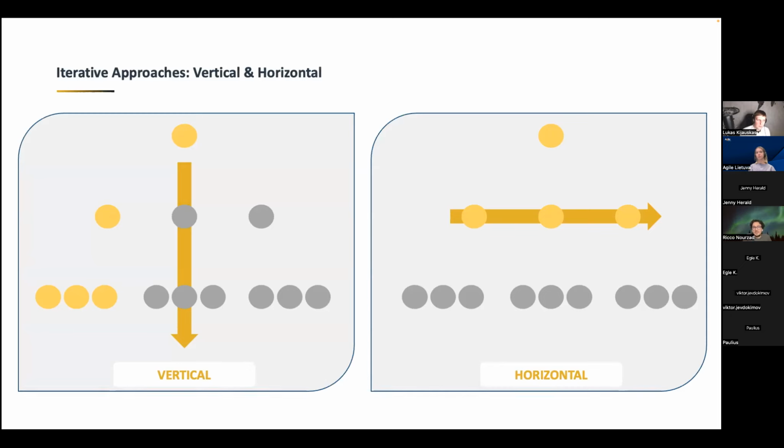And it's highly recommended to use firstly the teams which have, on the one hand side, a good standing in the company, who act like a lighthouse. And the other thing is I would use teams as early adopters which do have an agile mindset already. For people who are not used to working iteratively and in increments, it's kind of hard.